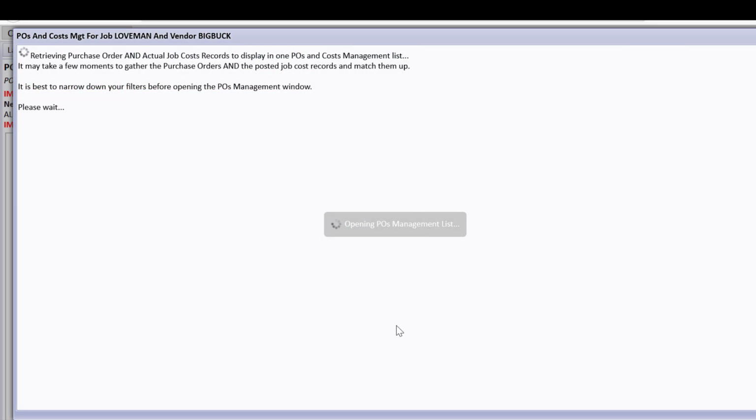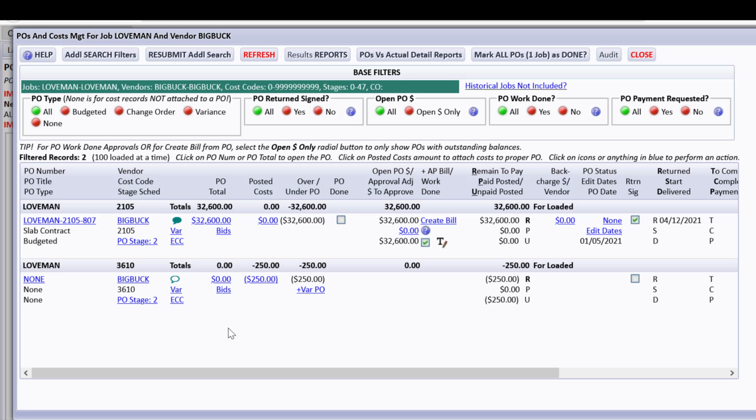money, $1,550. That $1,550 is being derived by a couple of things, posted costs already for this job, and just for this job and for the vendor. So if you look at this for a little bit, you'll see where it's coming up with the $1,550 that it's going to be over the POs, but we are alerted about that.